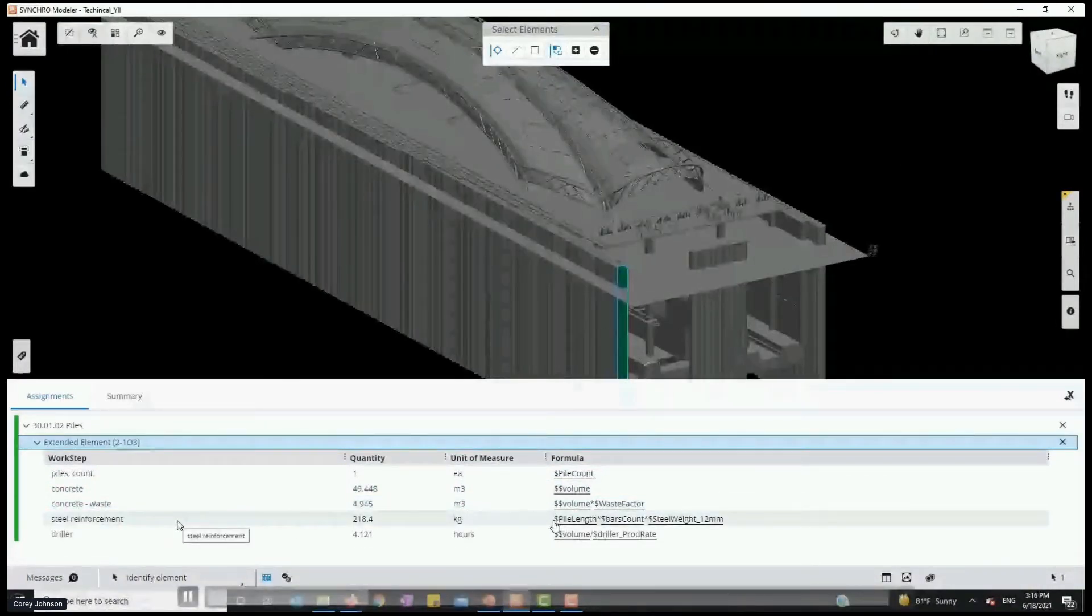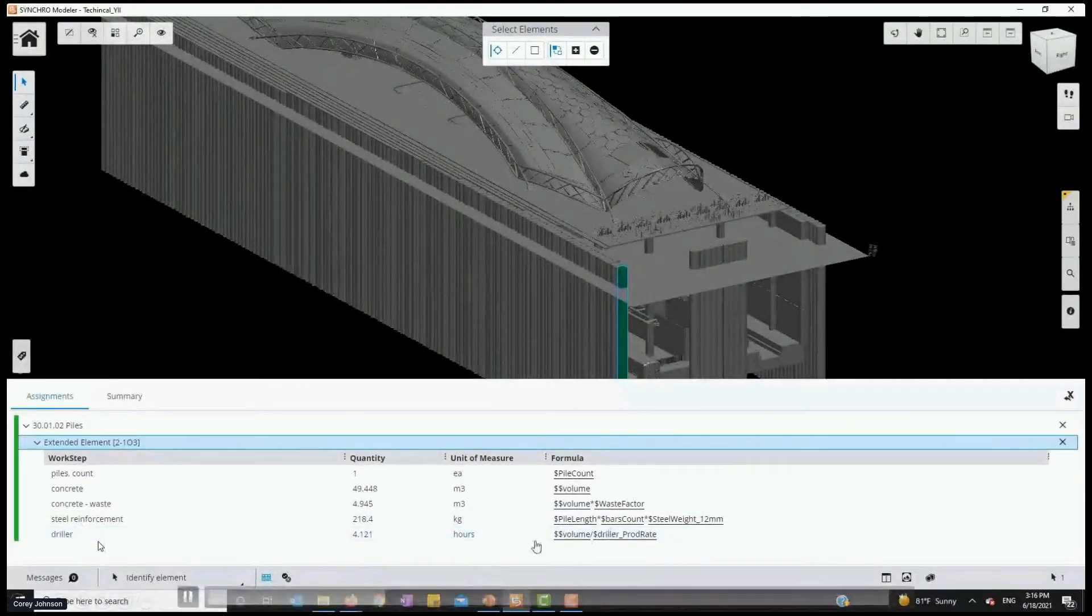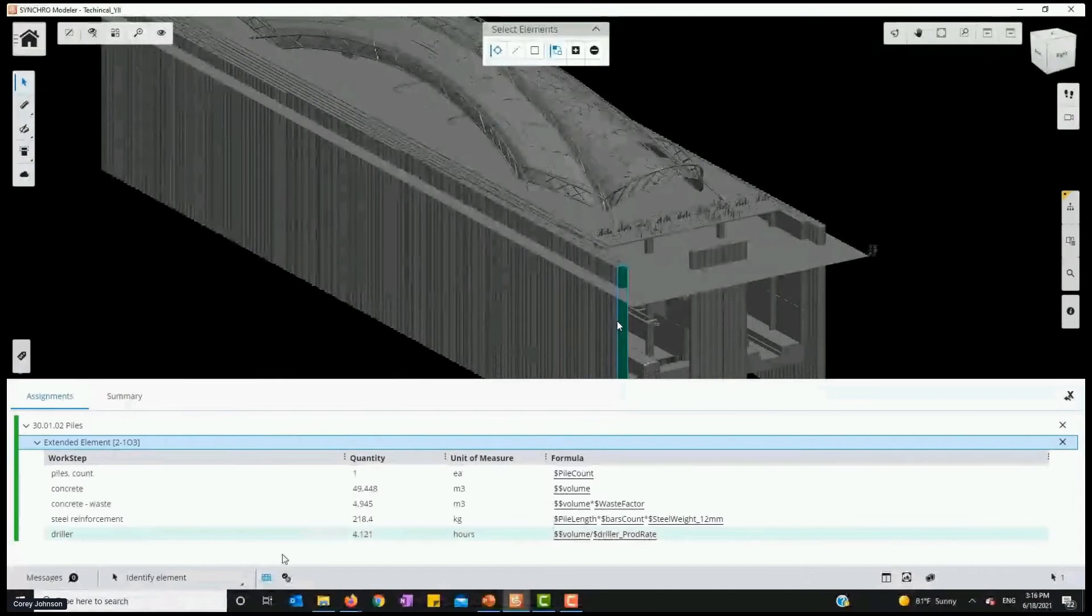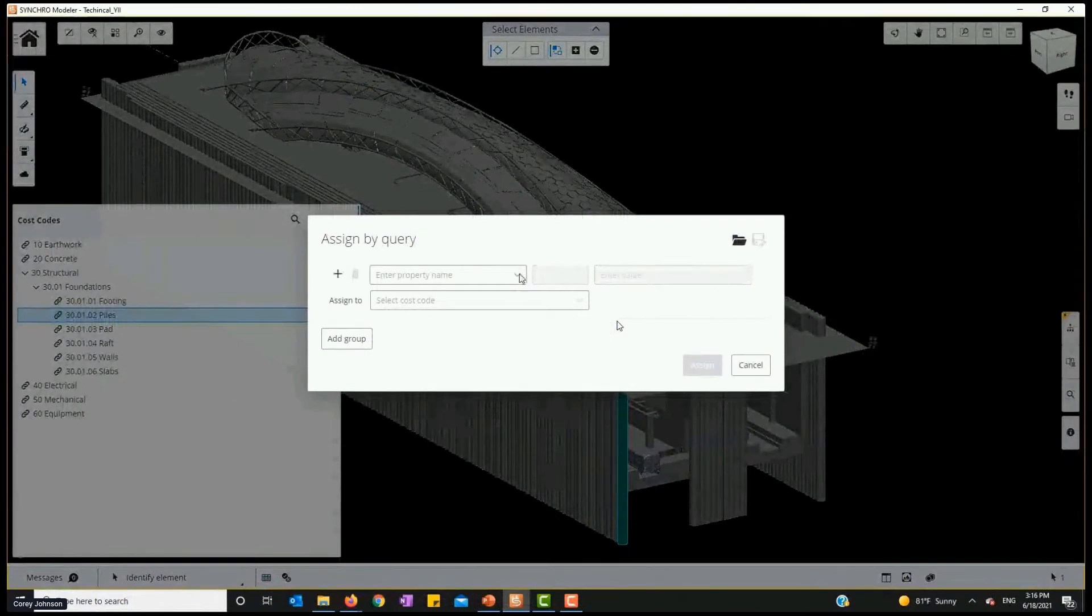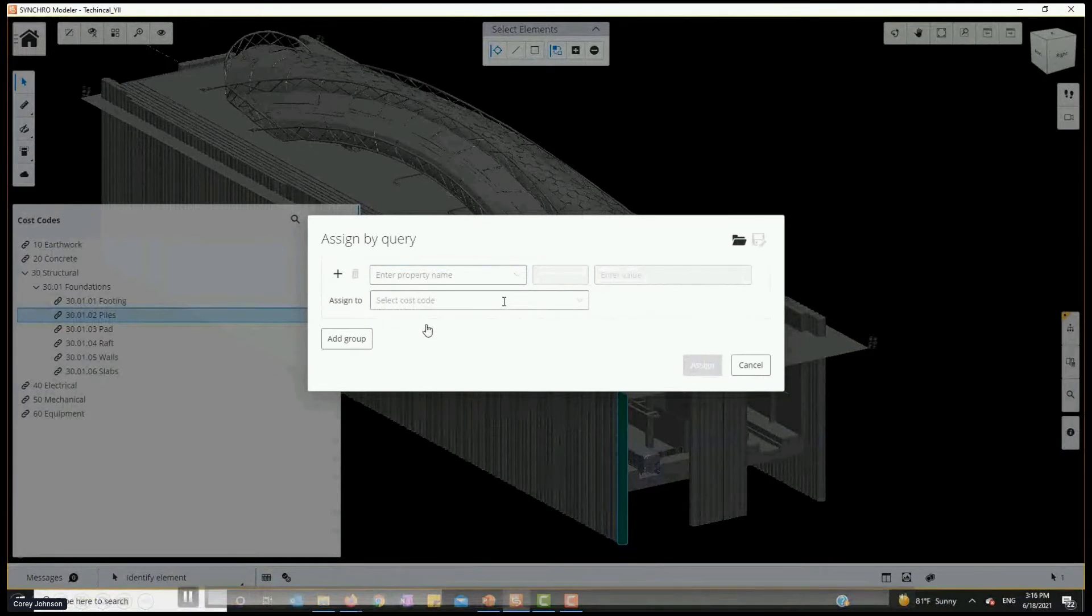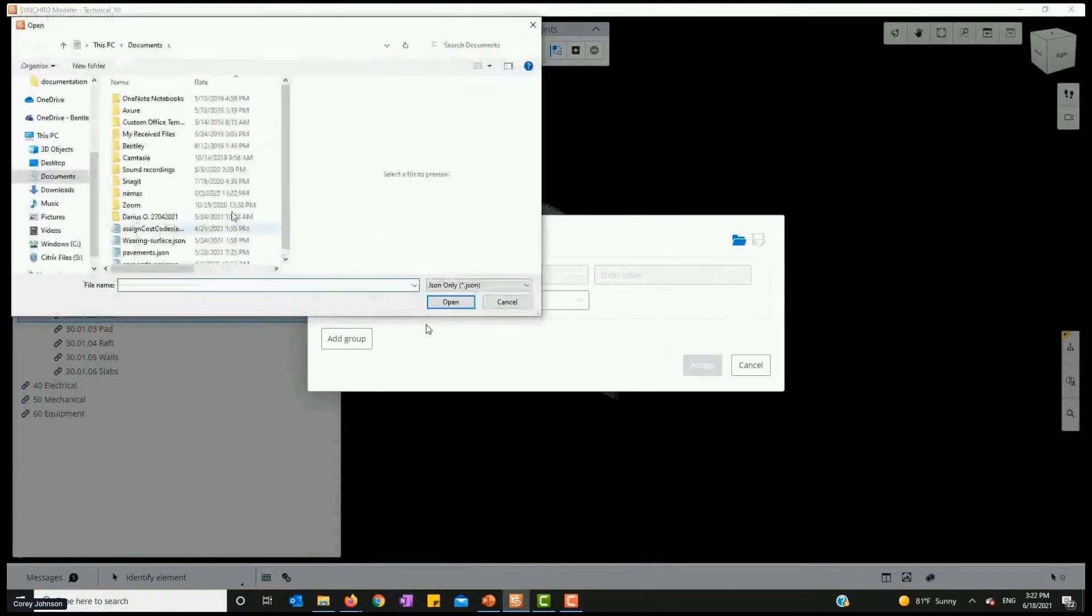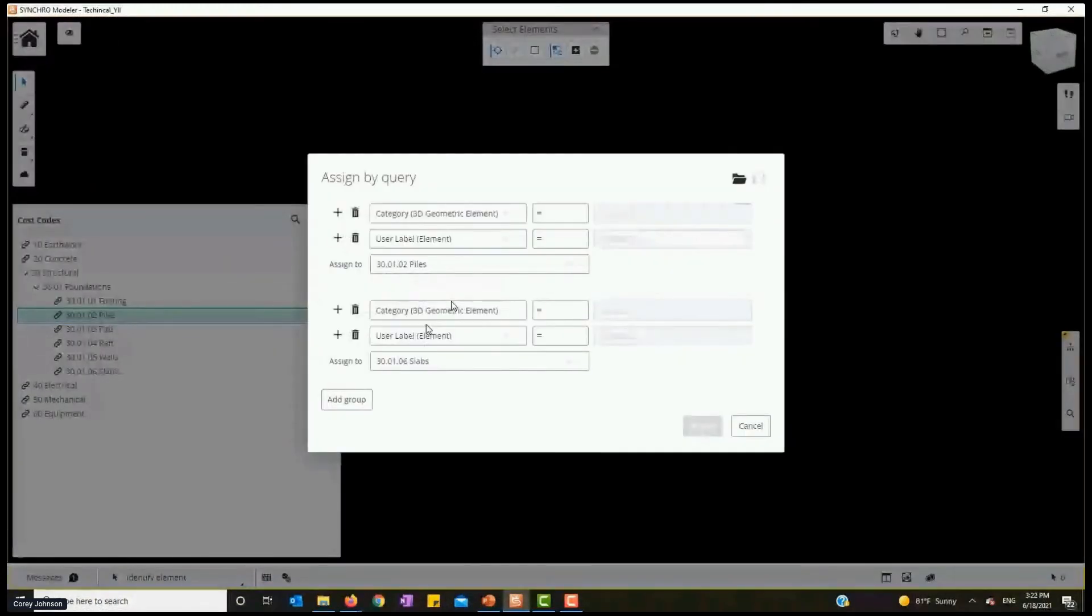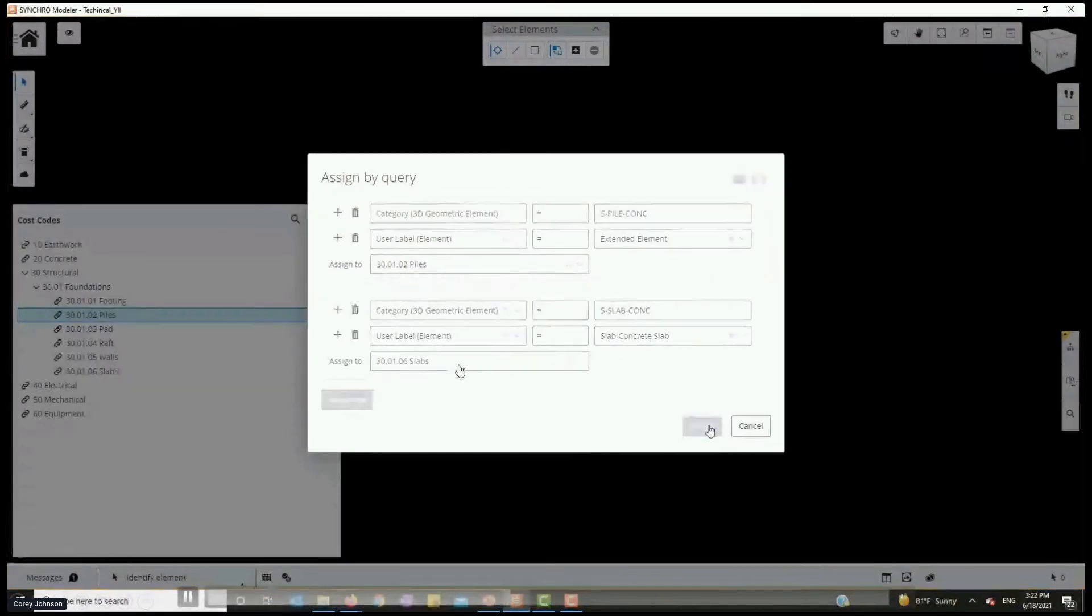They also put in a factor for estimating the steel reinforcement, and we knew the production rate and we put a formula in. So we know how long does this take, based on our historical performance, for that driller to drill that pile. So real quickly we got five quantities out of one item. Now I could go through and select - and I got a lot of those, and it's very difficult. We can make this simpler by assigning these in bulk. Now again, I was called lazy in a former life - not lazy, I'm efficient. I've done this once before in my job, so I saved it. So I pull in my assignments, and I know that if it says concrete pile and it's got this information, I'm going to assign it a 30-01-02. I got concrete slabs - a 30-01-06.